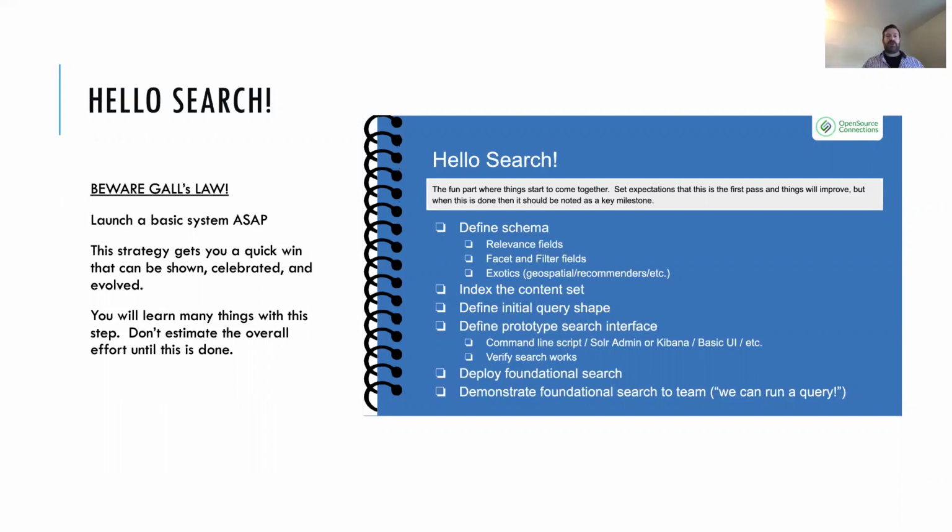Say, well, we'll get to Hello Search in a month or 2 months, maybe less, maybe more. And say, well, when we get here, then we'll know, maybe you want to bail out at this point. Maybe this is some cost. You say, okay, well, that didn't work. Let's try a different engine, or let's revisit something else. So getting here is really, really important, because then you can take what you know from this step and estimate the whole thing and say, well, we know what's important, and it's going to take X amount of time. And then you write all that stuff down, and you write things down that you need to know.